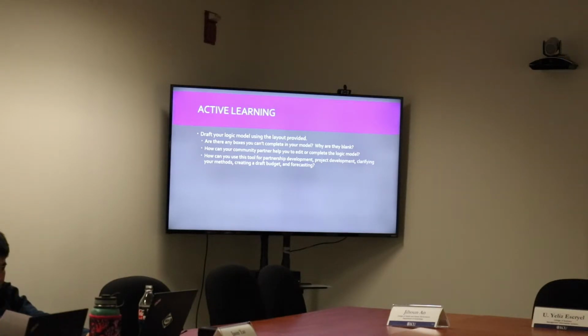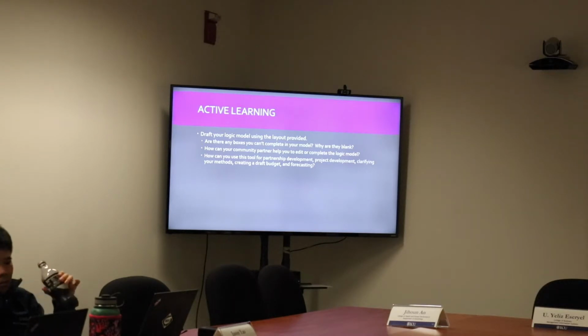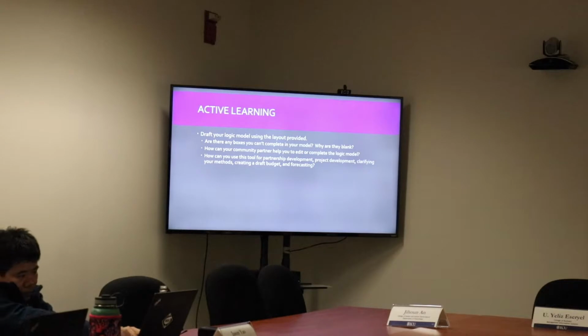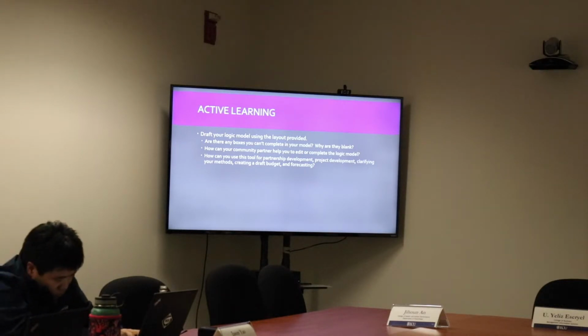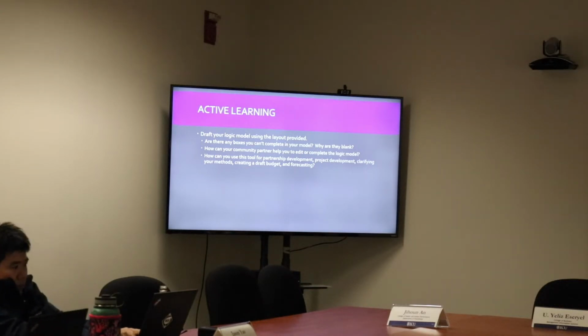Resources can be physical, financial, human, natural, or other resources. So you can see here Beth has listed out she needs 2 ECU faculty, she needs 2 OT grad students, she needs access to this room, an audio recorder, she needs somebody to do transcription work, she needs transportation to Kinston, a camera, monthly meetings with the research team, etc. Those are all pretty easy to understand. What are the things that she needs to make all this happen?